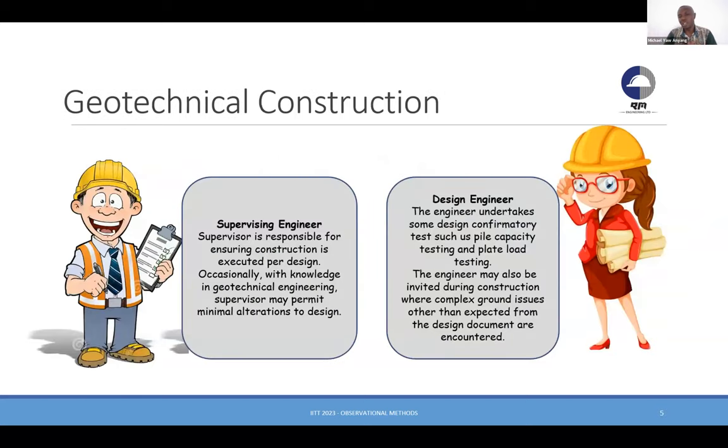You look here and you can see clearly, in most of these red and yellow books, there's a clear distinction between the supervising engineer and the design engineer. Most often you have the pre-contract stage and the post-contract stage, and the pre-contract engineer may not ever meet the post-contract engineer. So you do your geotechnical investigation, you write your report, you do the foundation design, you give it to clients, you have been paid, and you go and start your construction. The next time you may get there, the building has been erected. So the OM approach is not really much used here.